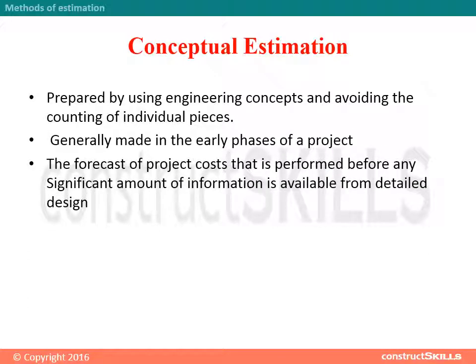A conceptual estimate is prepared by using engineering concepts and avoiding the counting of individual pieces. This is generally made in the early phases of a project, to forecast project costs that is performed before any significant amount of information is available from detailed design.